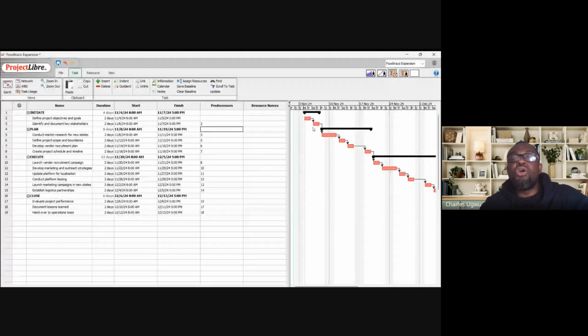It means number 3 cannot start until number 2 is finished.